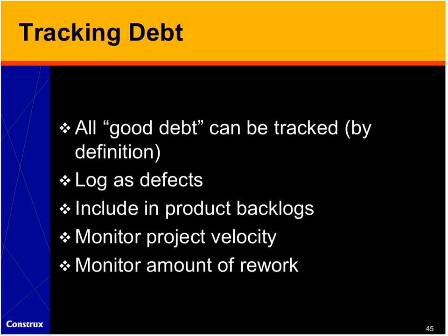And in terms of measuring the effect on the project, we've seen some companies that monitor project velocity, and they'll say once our velocity drops below a certain level on a per iteration basis, we'll make the assumption that the debt is getting to be too burdensome, and so schedule an iteration to do some debt reduction.